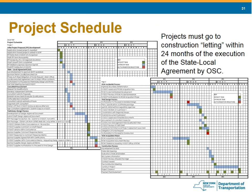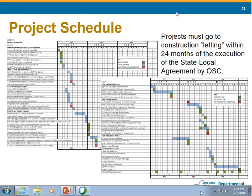For the project schedule, there is no specific format required — you must upload it as part of the final application. Questions in the application will let you indicate where you are in the project development process. Projects must go to construction letting within 24 months of an executed state-local agreement through the Office of the State Controller. The further along a sponsor is with a project, the greater the chance of meeting this schedule. If you have any additional project documentation such as SEQR, NEPA, or design approval documentation, you can upload those documents as well.